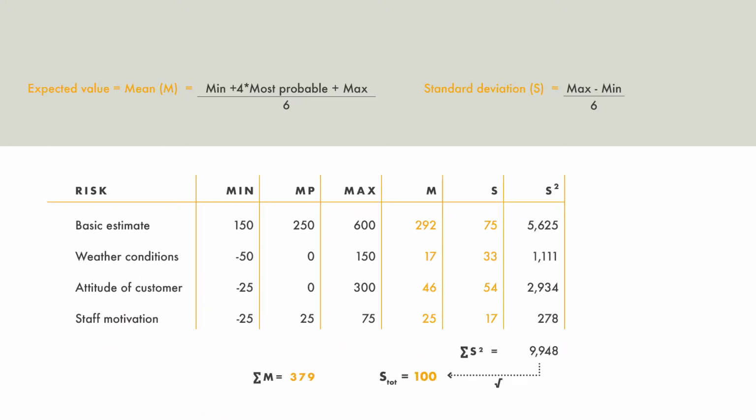Okay, now in this picture, we take this risk analysis of this flipboard stand even further. In the table that this picture shows, the 3-point estimate that I just showed you is used only as a basic estimate that includes those man hours, material price, and estimate uncertainty as sources for variation.